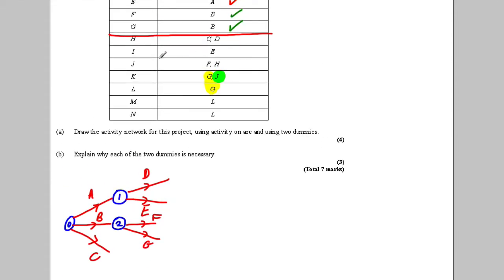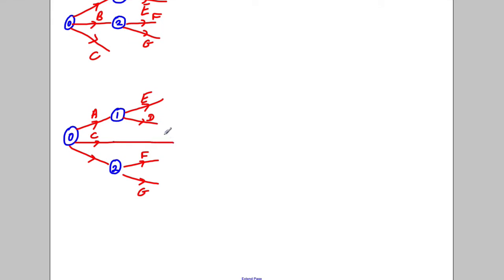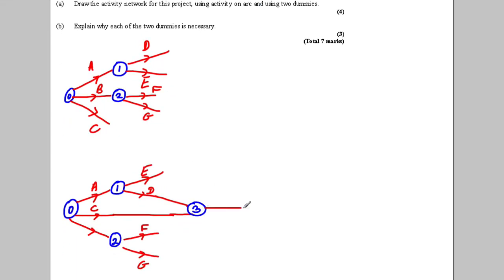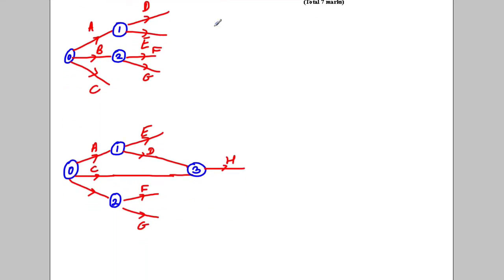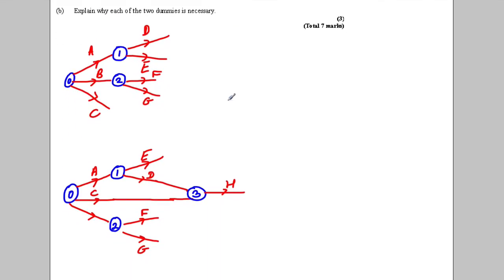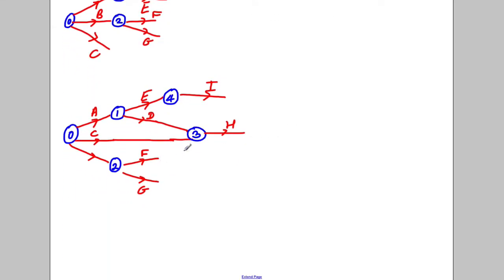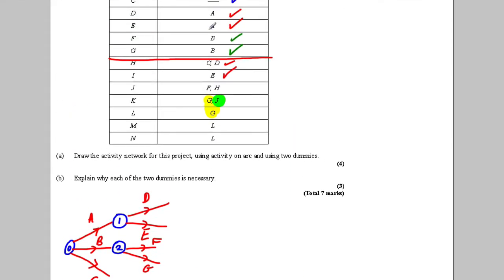H depends on C and D, so both C and D must finish off into node three, and H comes out of node three. I depends on E having finished, so I close off E and have I coming out — possibly coming back down. J depends on F and H, which are close enough together, so F and H finish at node five and J depends on that.